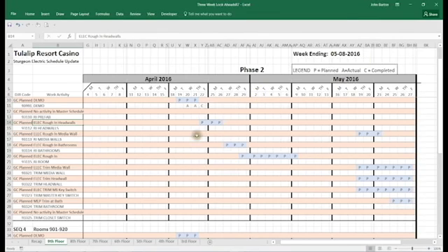So these should actually be done. And if you get a chance, you should go back and see if you can document when they actually occurred and just fill it in. Just put an A here and an A here, or if you actually did work that day, an A. Then sometimes we'll find that you don't work for a few days and then you come back.